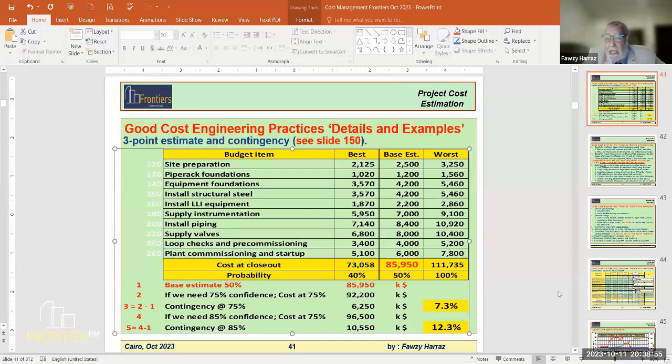But in any case, when I say the valve is 400, it is qualified by a vendor quotation. If the vendor doesn't respond, what I will do is I refer to a similar project. Okay, it's not the first project, it's not the first gate valve, right? So there is a project. Yes. The project could be 2 years ago, and the price could be, say, $300.